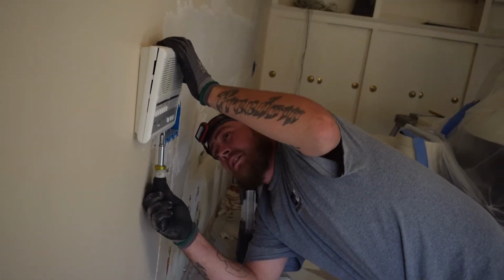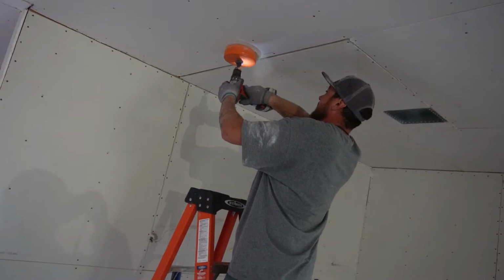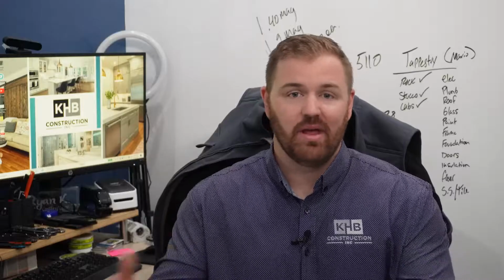When we would charge is when it's something that is out of our control that the homeowner puts on us. So the homeowner wants to add a bunch of speakers or add a bunch of new lighting. That's when we would charge for that change order. So I wanted to preface the next 4 steps to let you know what a change order is, why they happen, and when they would happen.